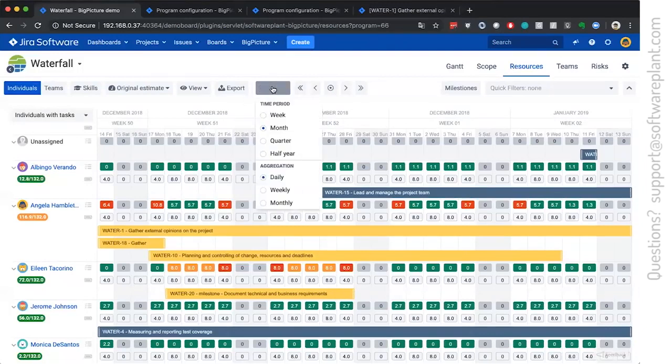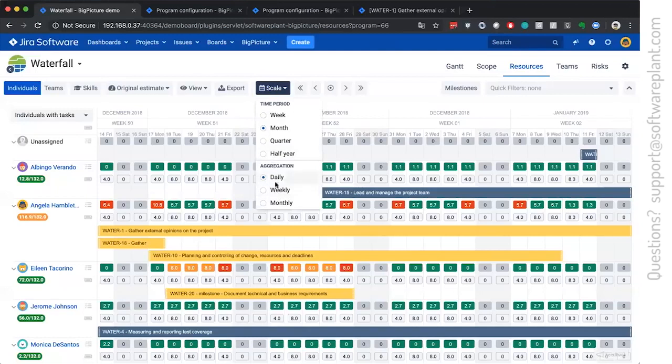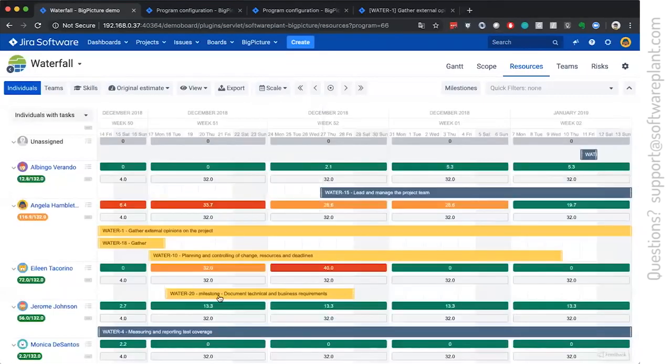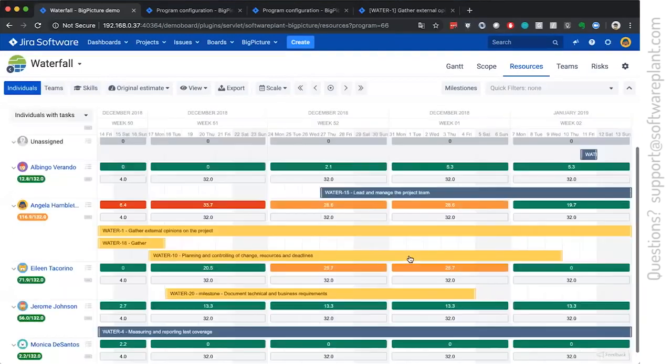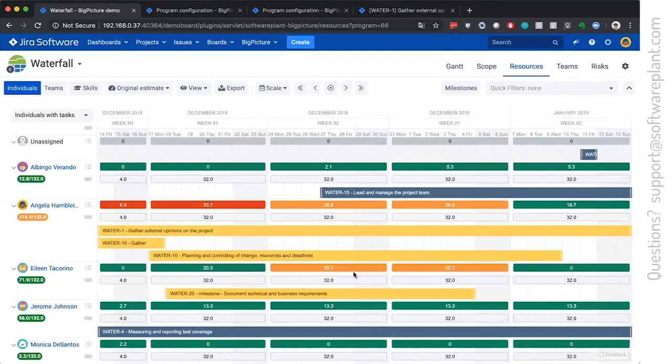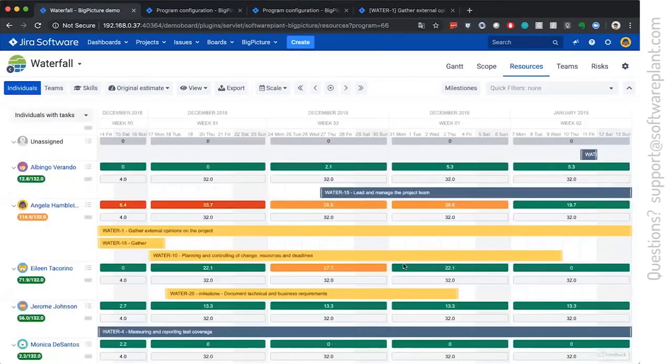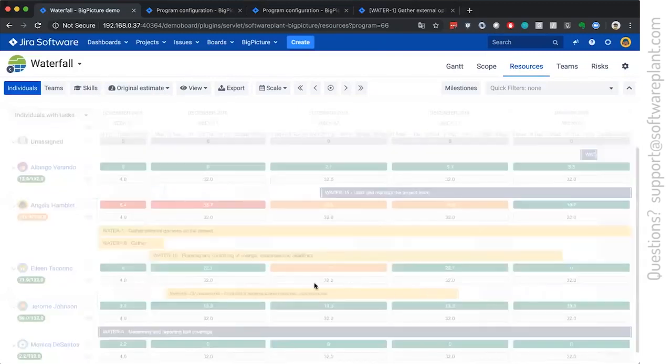And to see that we will switch to aggregation weekly. And then we will see that she's weekly available 32 hours. So we will have to spread it across more days. And the numbers will go down because she has more time now. And she will feel more comfortable and adjusted.